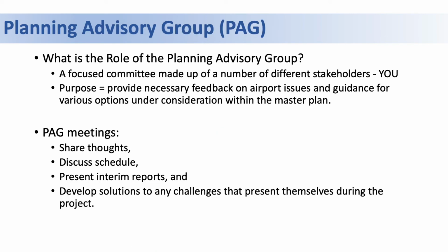The Airport Master Plan has developed a planning advisory group. The Planning Advisory Group is a focus committee made up of a number of different stakeholders. The purpose of the committee is to provide the airport with feedback on issues and guidance that are under consideration as part of the master plan. The PAG committee meets to share thoughts, discuss the project schedule, to review and comment on interim reports, and develop solutions to any challenges that present themselves during the project process.